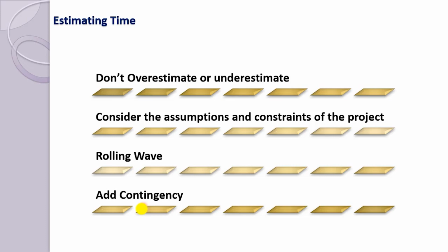So adding contingency means when certain things happen, like some priority issues come, you can use this time. Most people are working on more than one item at a time. Some efficiency is therefore lost due to task switching, the time it takes to shift from one job to another. As well as task switching, you will need to take into account all the day to day tasks that need